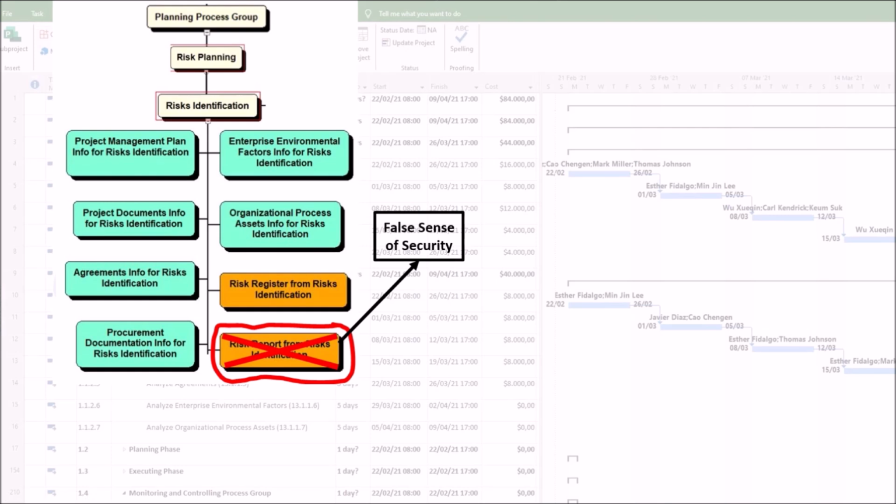1. It creates a false sense of security. A report that is vague, incomplete, or fails to highlight high-priority risks can lead management to believe the project is less risky than it actually is. This results in complacency and a lack of urgency for further risk analysis. Conversely, a report that is poorly structured and presents every minor issue as a catastrophe can create unnecessary alarm and panic, leading to misallocated resources and poor decision-making.